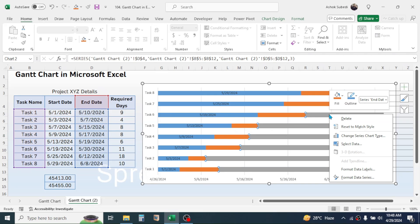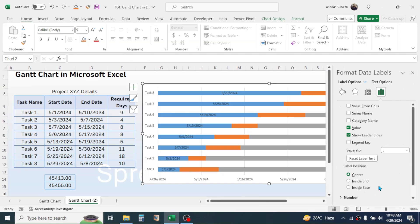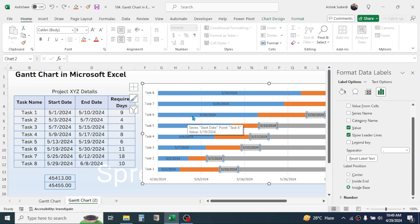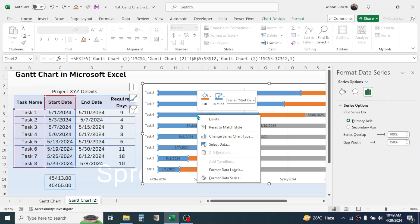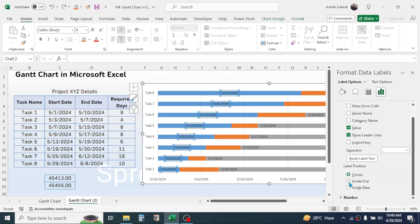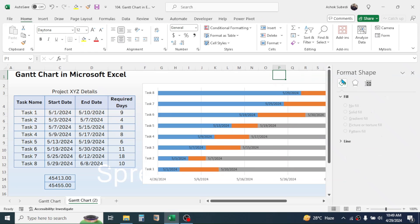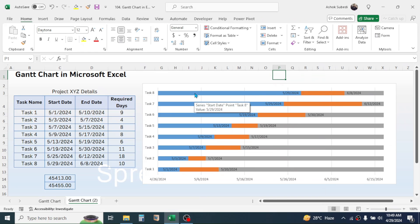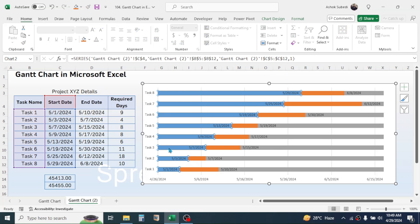Right-click on the end date labels and go to Format Data Labels. In the label position, choose Inside Base. This will display the ending date beside the required days series. Now select the starting date data series, right-click, and click Format Data Labels. In the label position, choose Inside End. Now the starting date is shown on the chart.